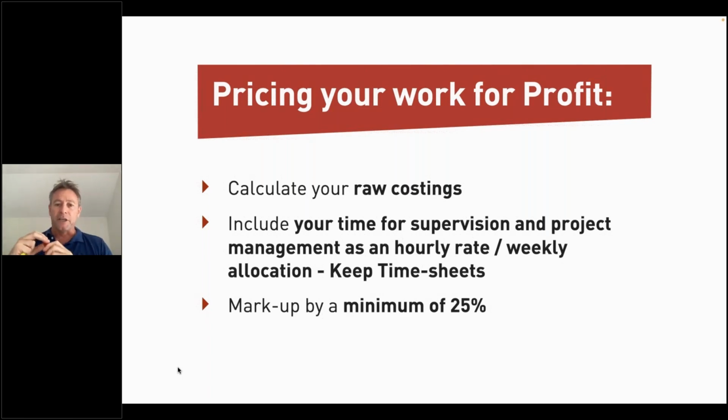So, a really simple but powerful process for pricing accurately. I would highly recommend that if you're doing renovations, which is the most staple niche or specialty at the moment, that you use a minimum 33% markup, which is a 25% margin. Most of the guys I'm working with are using a 42% markup for renovations, which is a 30% margin. Okay, but also costing yourself in.